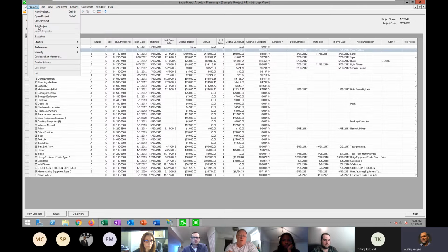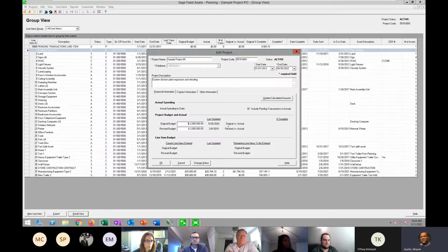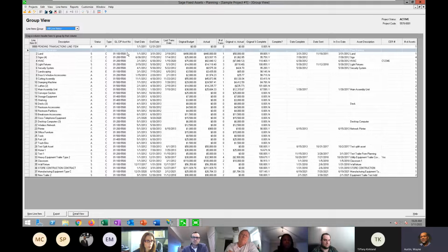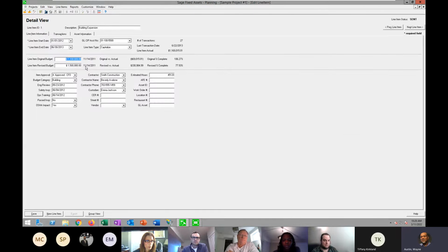So let me just differentiate something real quick here. Remember, you're going to have whatever budget and revised budget you set in the beginning. Now, each of these line items, remember, have their own budget. So at this level, as he gets these bids and quotes, let's say you're doing a new build out and you just got a quote for the HVAC system, right? So you're going to create a line item like I did here for that HVAC system at whatever that budget is. So he would be creating this part, right, and get it set up.